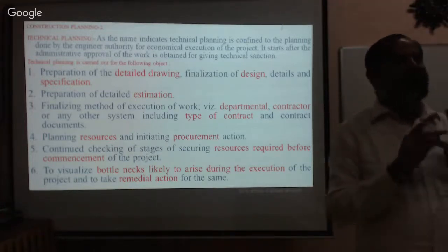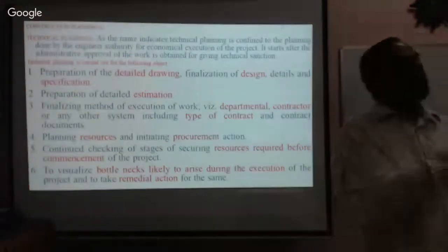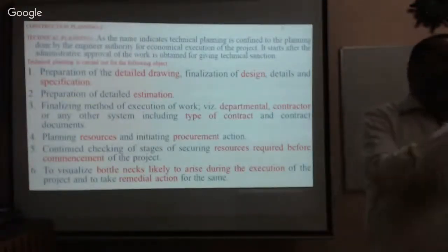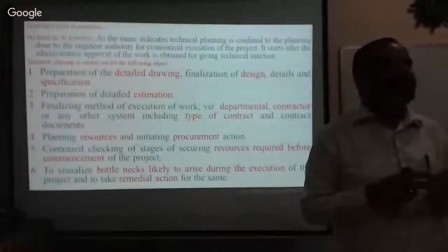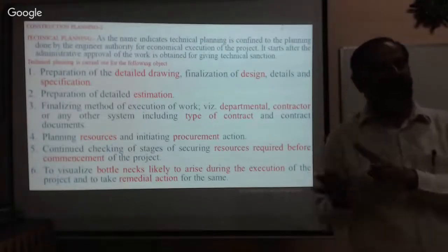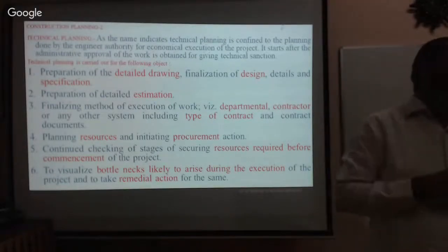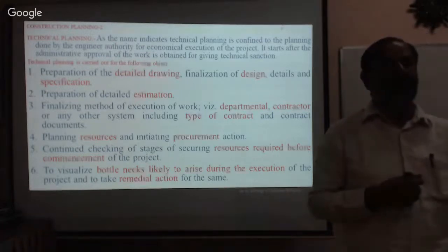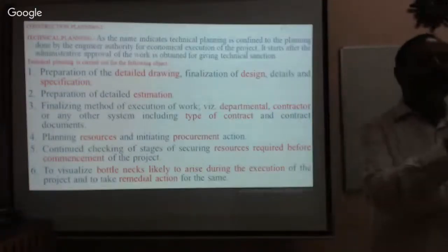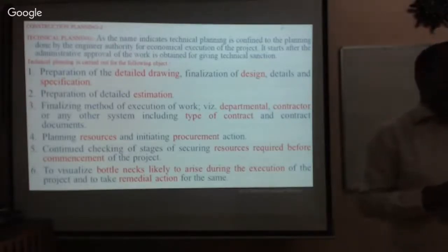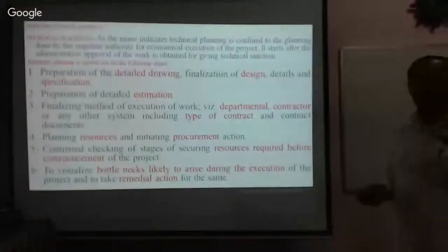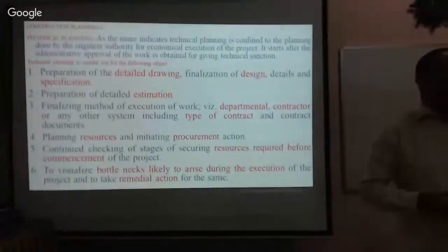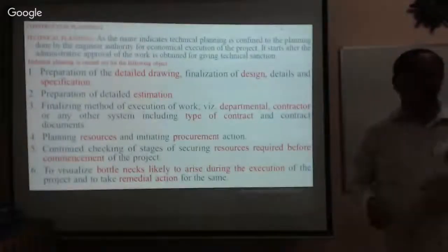Some contractors are smart enough. They will complete the project before the dates, and they will get a bonus for that, isn't it? Both clauses will be there. Being a project engineer, if the project is delayed, you ask for the penalty. Suppose the contractor completes the project one month early, then you need to give him a little more money. Both clauses will be there. Therefore, you must prepare mentally that I am going to execute the project. Okay? Got it?